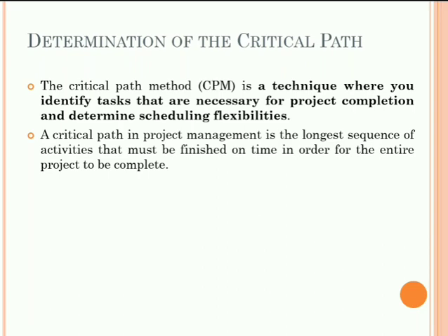Here you can use the backward pass also. That is used to calculate the late start and late finish. Late start is the late finish minus the duration, where late finish is the lowest late start value from the immediate successors.